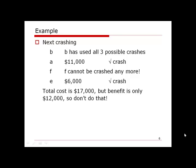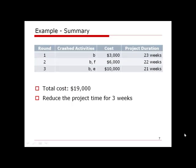To summarize, we crashed the project over three rounds: Round 1 — crash B at $3,000; Round 2 — crash B and F at $6,000; Round 3 — crash B and E at $10,000. Total crashing cost is $19,000, and the project duration is reduced from 24 weeks to 21 weeks. The total project cost is 21 weeks × $12,000 plus $19,000 in crashing costs.